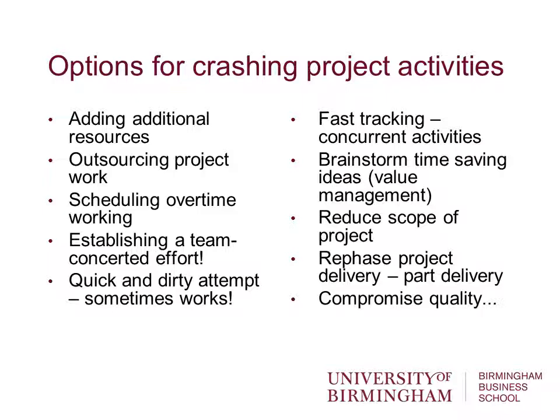We can brainstorm different options for time-saving ideas, sometimes called value management. We can reduce the scope of the project by taking activities out of it. We can phase the project, so we can have part of the delivery at one point and then carry on some work and then deliver another part of the project a bit later, often used in software projects, IT projects. Finally, we can compromise quality, do things more quickly, take shortcuts, source products and services which won't necessarily deliver us the quality we want, but will save us time.